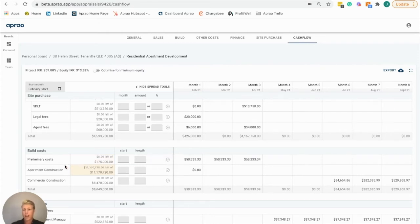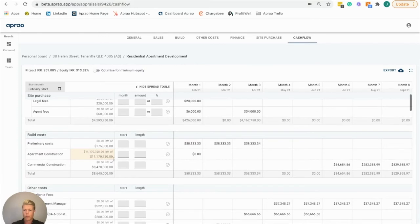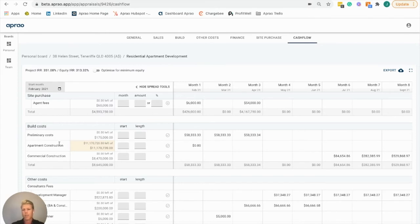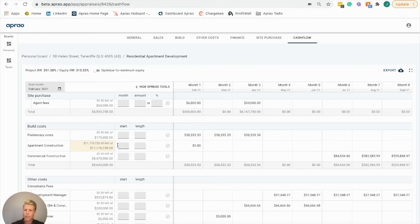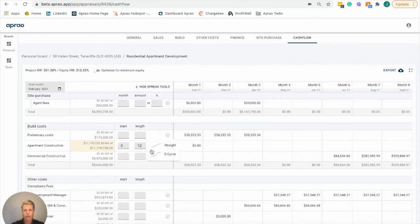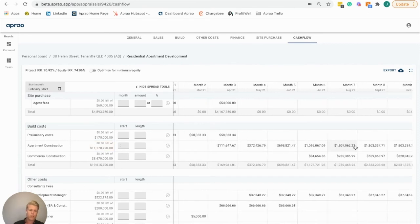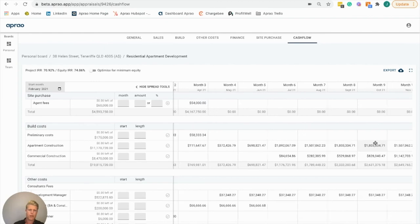We're also able to do multi-phase construction if you've got different elements within your project. In this example, we've got apartment construction and commercial construction. The apartment construction will kick off around month three and take us up until month twelve. We'll hit apply and apply that in an s-curve. We see that ramping up all the way to that 1.8 million mark.